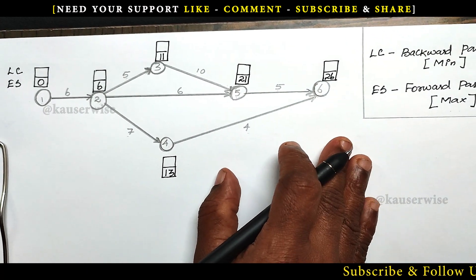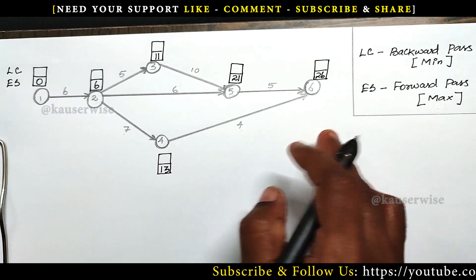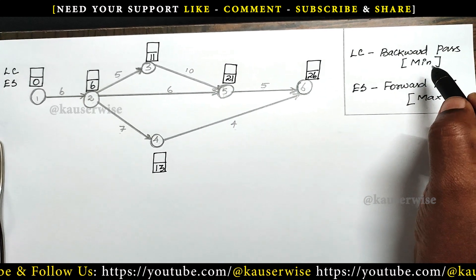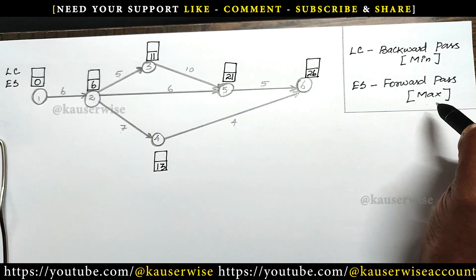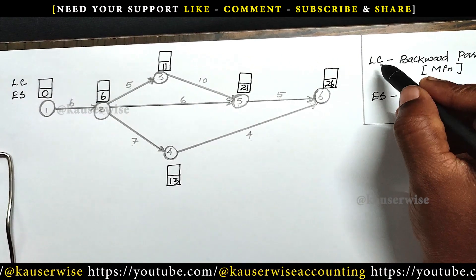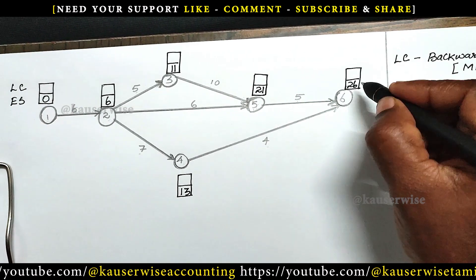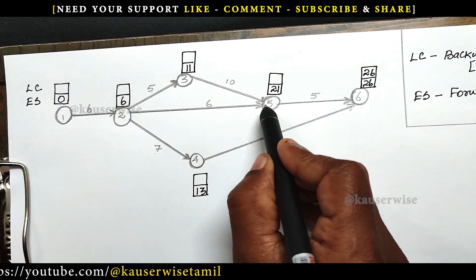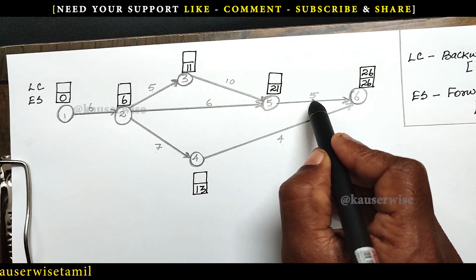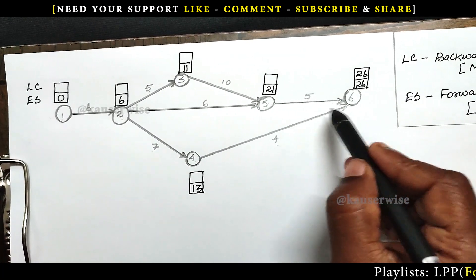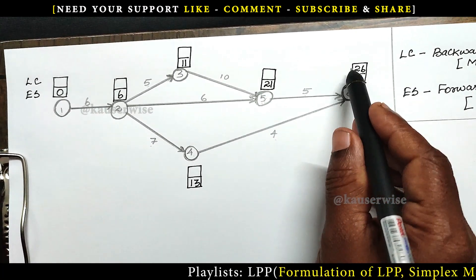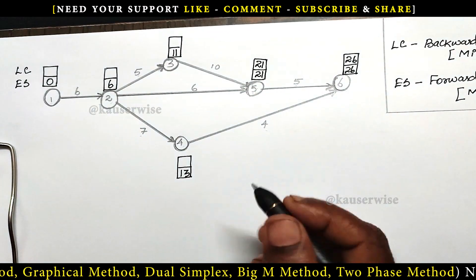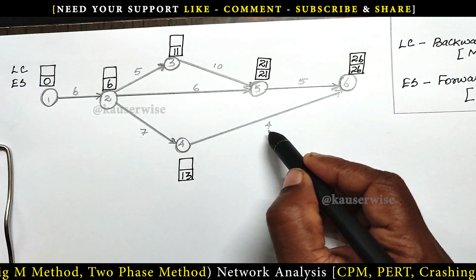That's all — this is the way to calculate earliest start time for each and every node. Now we need to calculate latest completion time. For that, we need to apply backward pass. If you have more than one option, we need to select the minimum one — instead of maximum, we select minimum duration. We need to start from the last node. Enter the same duration as the latest completion time: 26. Now for node 5: 26 minus 5 equals 21. We need to subtract for latest completion time. For node 4: 26 minus 4 equals 22.